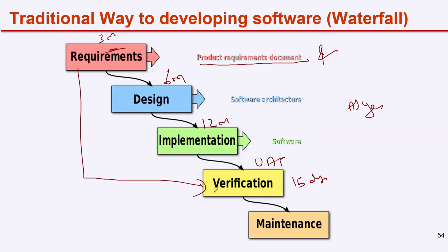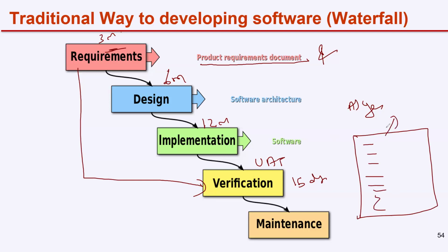We cannot go back and tell them, oh, while testing, we had a look into the product, we have some new requirements. Is it? No. Whatever your new requirements, put them separately. This will be additional requirements. We will take them to the change control board. If they approve it, then we'll incorporate it. For that, we will need additional time, additional money, maybe another 3 months. Then they will publish it.